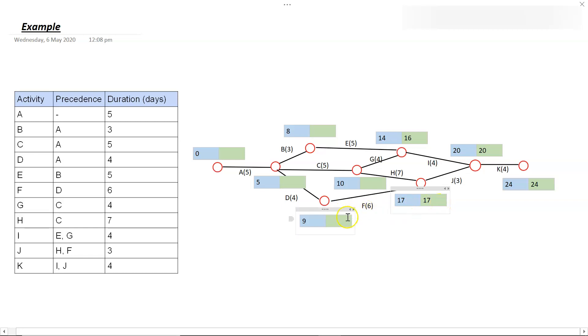If we were to go back down this path, we'd have 17 minus six, which is 11. And then if we were to continue this way, because this one only has one activity coming to it, we have 11 minus four. So 11 minus four becomes seven. And then we'd continue on and take away five, which would be two. I'm just going to leave two there for now, just because we followed that bottom path along, but it would most likely change because these nodes would take us down further and hopefully to zero.